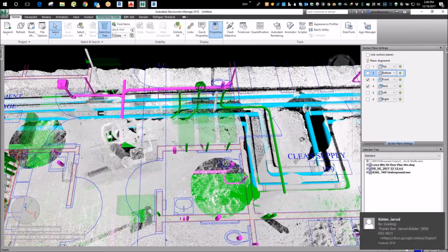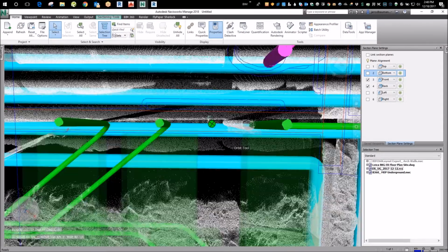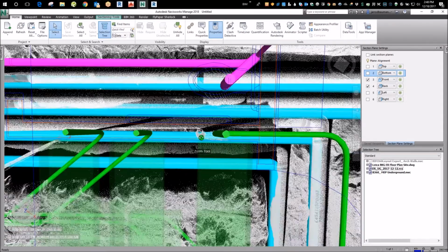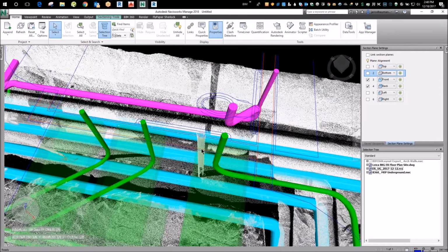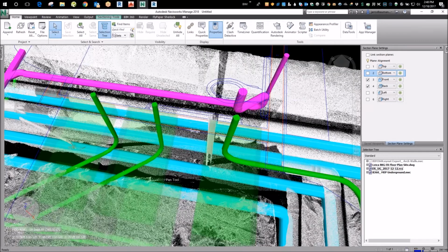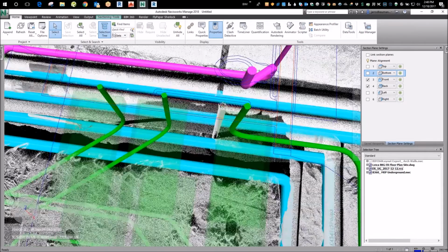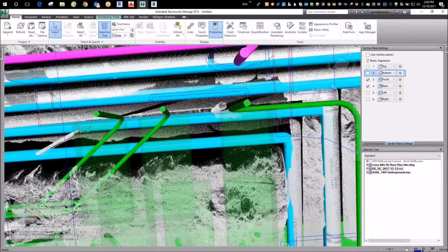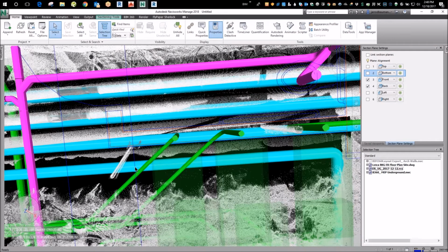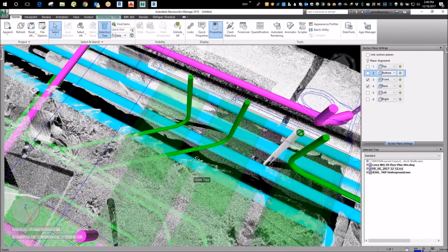So you're looking at things like this over here. He has 3 conduits to put in here. He's only got 1. I mean, you could check quantities. Did they miss any, right? And I asked that earlier, and Eric and the team were like, yes, he actually has to put 2 more in, but because you can see Coutts pipe underneath, they had to dig those in, and they have to wait to put these in after.